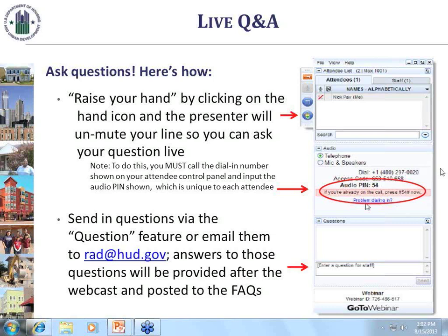We start with that. What you convert does not have to be that. It can be any portion of that or any combination of that plus units somewhere else, as long as what you're converting is a manageable, marketable entity. We're happy with that. So you can split units out of existing AMPs. You can combine them with other units. Whatever makes sense is fine with us.